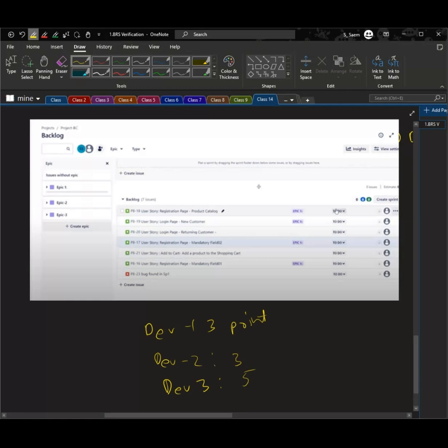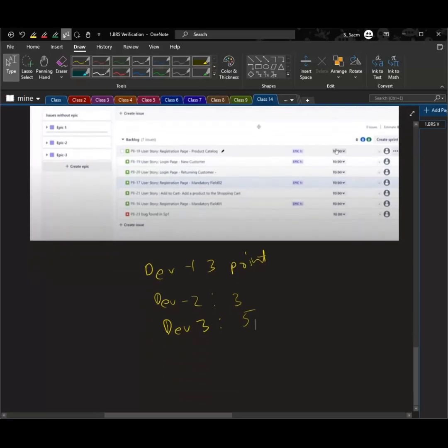estimates 5 points because they believe additional changes are required, such as modification to the registration button, color schemes, or font size. The developer justifies their estimation during the discussion. For example, Developer 3 discusses why 5 points are necessary for the additional efforts. This justification will later be presented in the refinement sessions.